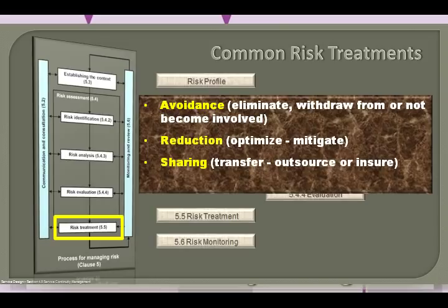Some ways of managing risk fall into multiple categories. Risk retention pools are technically retaining the risk for the group, but spreading it over a whole group. Risk retention involves accepting the loss or benefit of the gain from the risk when it occurs. True self-insurance falls in this category. Risk retention is a viable strategy for small risks where the cost of insuring against the risk would be greater over time than the total losses sustained.